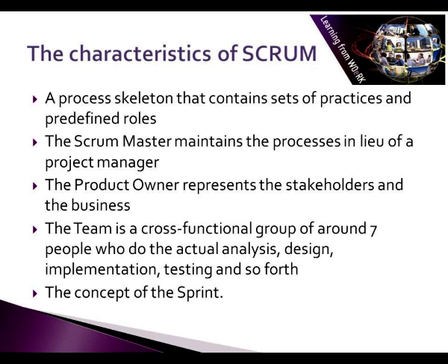The concept of the sprint is important, whereby the team creates a potentially shippable product increment, for example working and tested software. The features that go into a sprint come from the product backlog, which is a prioritized set of high-level requirements of the work to be done. A very useful description of the sprint is given in the Wikipedia entry on Scrum.